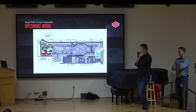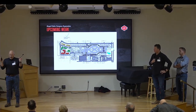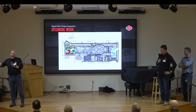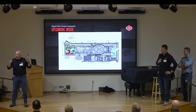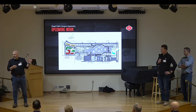You can answer every question with the lawyer answer: it depends. Yes. No. So what that means is we're preparing for if we can't open D and E together, we don't want to hold up one for the other. D has both elevators in it, so E can't open by itself. D can. So that's why we're trying to shift all our efforts to D, so that we can get something open the soonest that we possibly can that's functional.